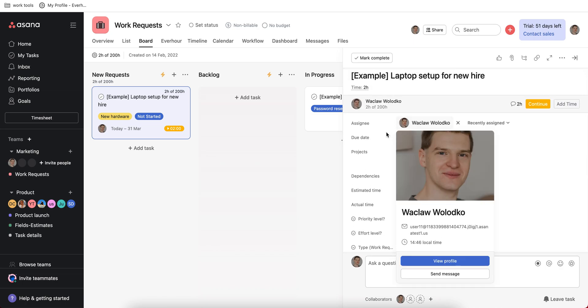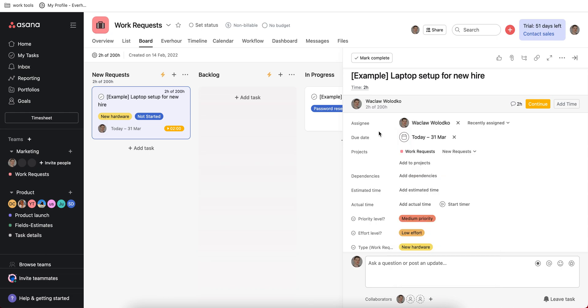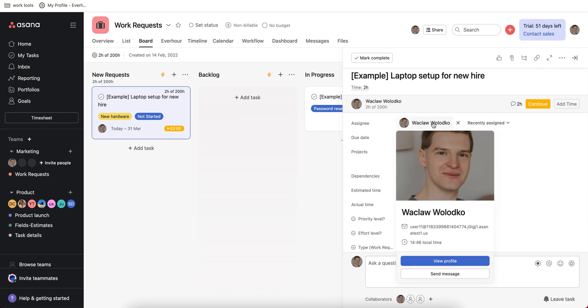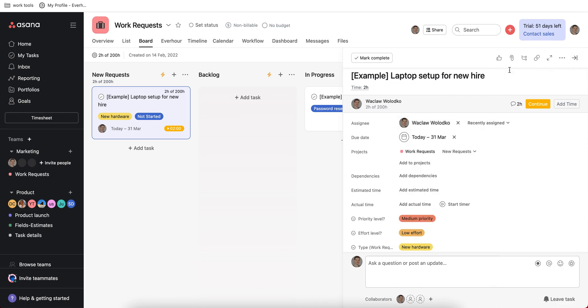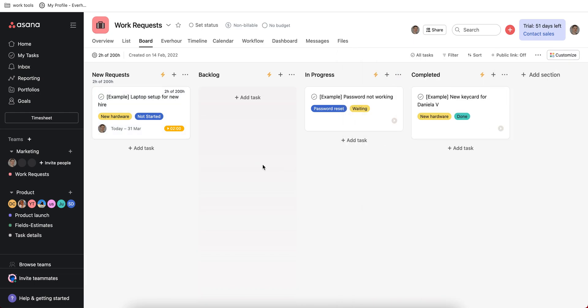Assign a due date, put an assignee on your task. That's important to know by the way that there can be only one assignee on a task in comparison to other project management tools. So keep in mind that if you'd like to formally assign somebody it could be only one person.